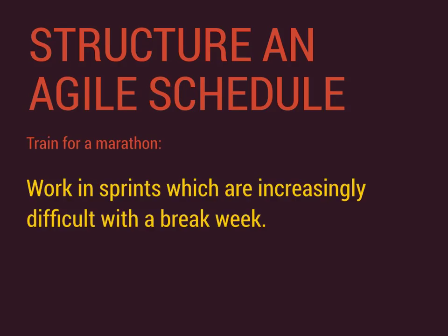And I have begun to think of the scheduling as sort of a marathon training. And I have never completed a marathon, but I've trained for marathons. And the basic structure is that you build up and then you have a recovery week. And you build up and you have a recovery week. So as you are planning out the sprint, the project that you're working on with your team, think about structuring the tasks that people will be completing in a way that they learn a little bit, do something they already know. Learn a little bit, do something they already know.